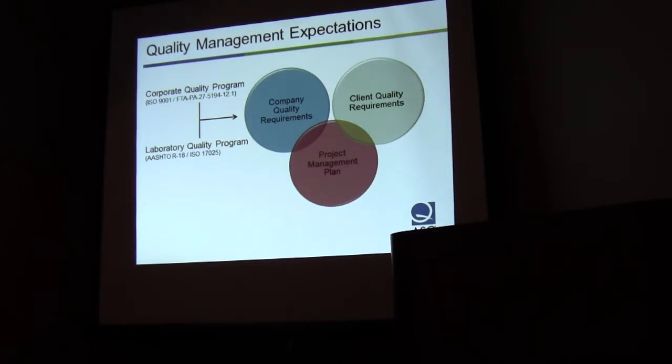So, long story short, we have a lot of internal requirements that we have to take care of and make sure that we're abiding by. But then we also have to take into account our client quality requirements. This particular project is funded by the Federal Transit Association, the FTA. The FTA has their own quality system of 15 requirements that looks remarkably like ISO 9001, except where ISO has maybe 8 sections, the FTA has 15.